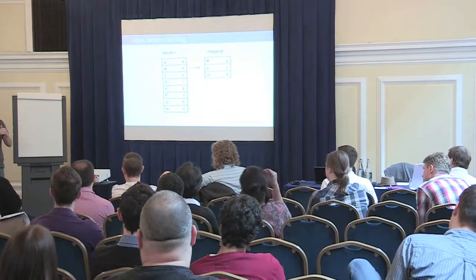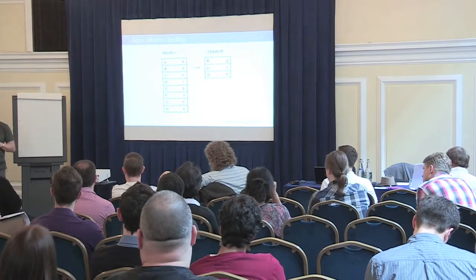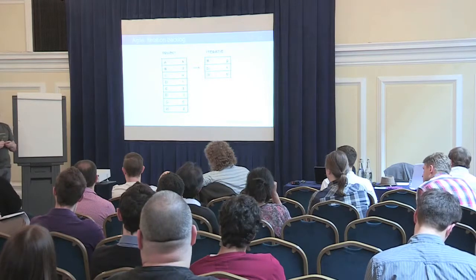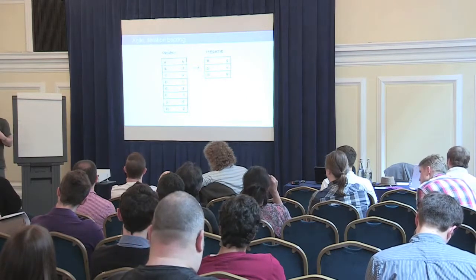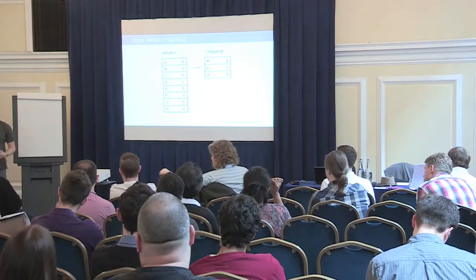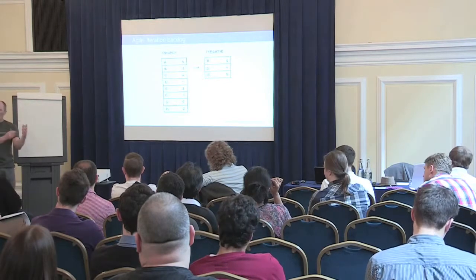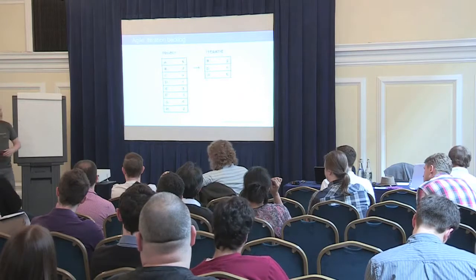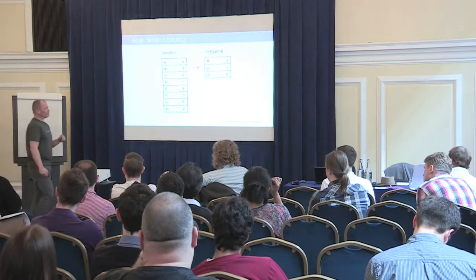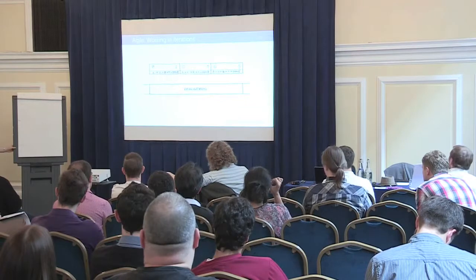And they had 6 sprints in a row where they didn't meet the deadline, because Scrum basically has a deadline right at the end of your sprint. And they referred to that as red sprints. I thought that was a nice phrase. Yeah, we have 6 red sprints in a row. So what does that mean? Well, that means we're not really successful, which wasn't true in my opinion, because they still did a lot of work. They just didn't finish everything that they had planned to do, but they progressed really well. So I said to them, just pick a little bit more work, and you'll be fine. And they were. So I could go again, right? This was like a 2-hour consultancy job. So that's good. So you have to pick the right amount of work, right? So that's basically how you do it. And then the thing is, how do you do the work?